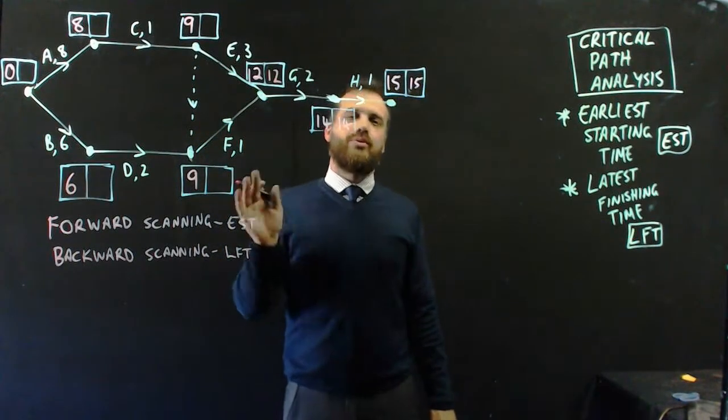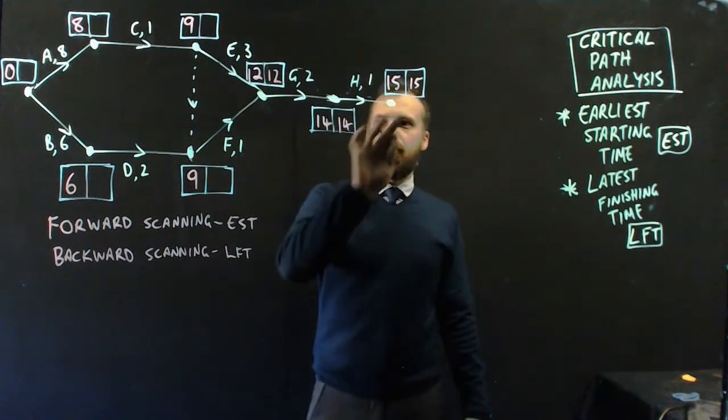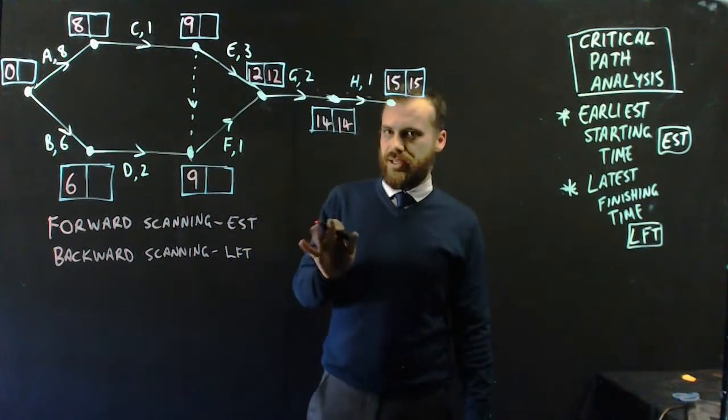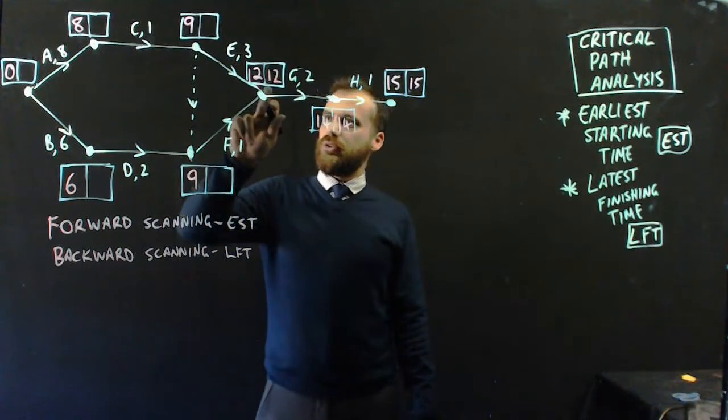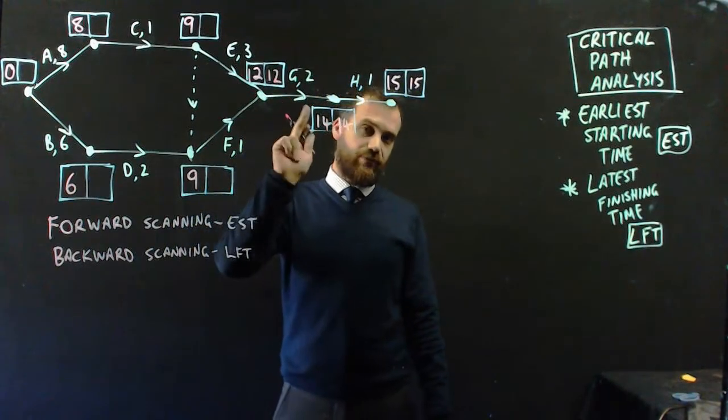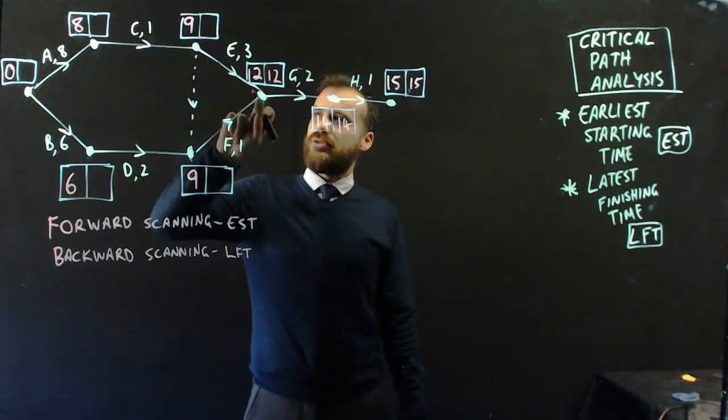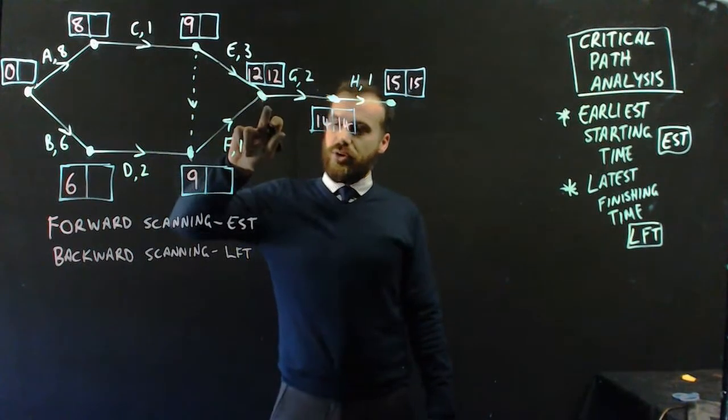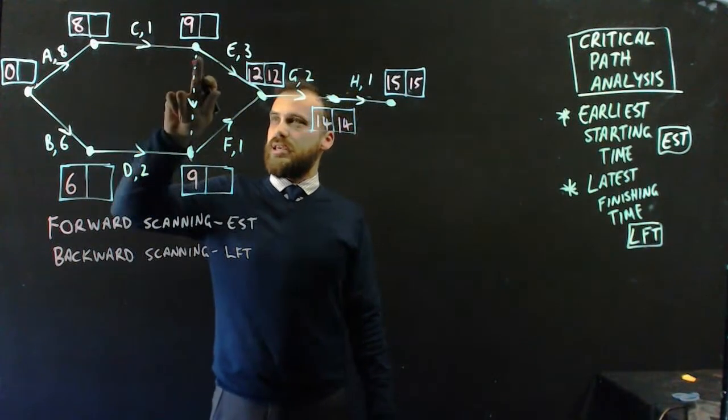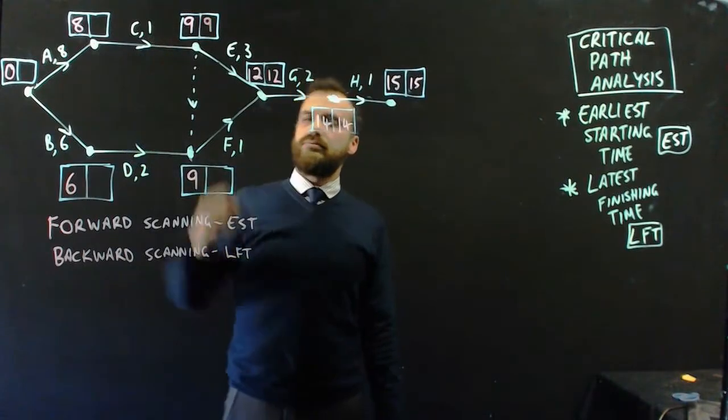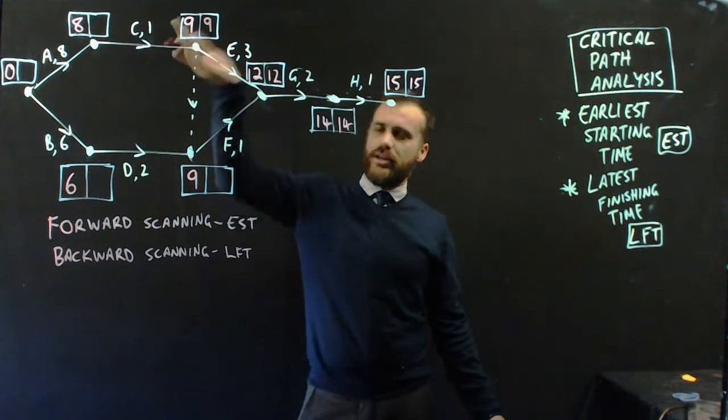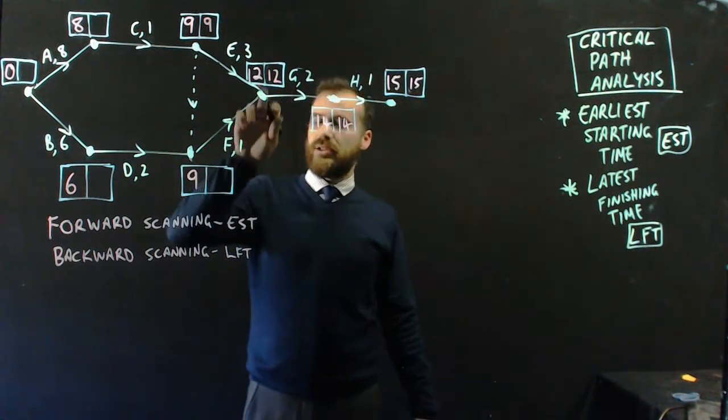And at the moment, you're probably thinking, what a waste of time. Just copy them, right? But this is where it starts getting interesting. Now look here. We have to get to this vertex at the twelve hour mark if we want to finish on time. Now E is going to take three hours. So we have to subtract three from that. The latest that C can finish is the nine hour mark. And you're still thinking, what a waste of time. This is ridiculous. We just keep writing the same numbers in.